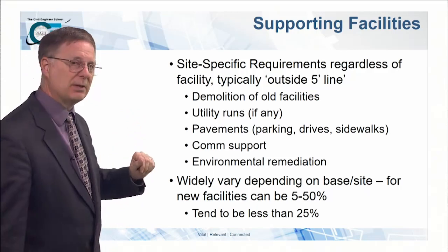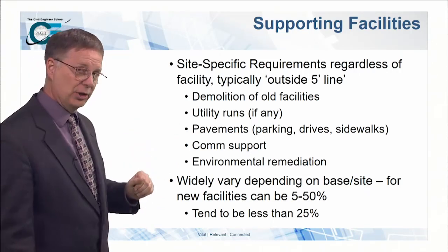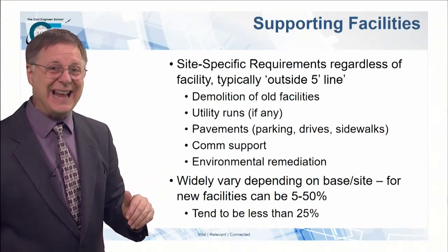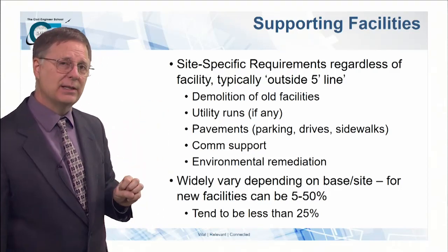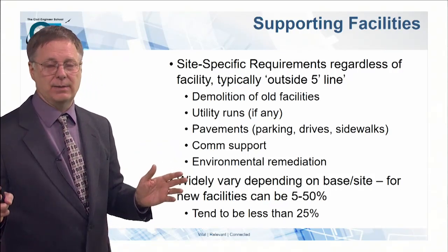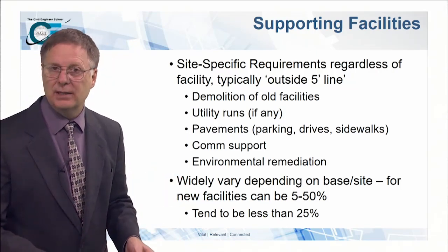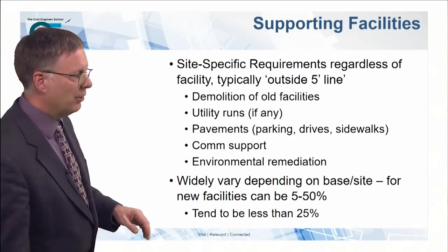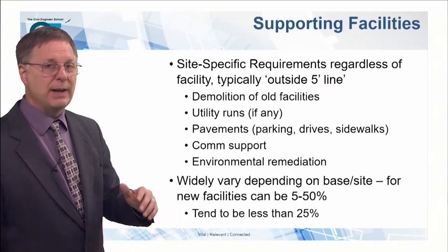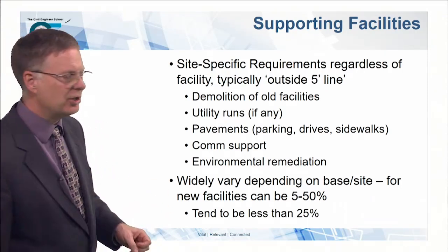Supporting facilities, again, are site-specific requirements. So they're typically outside the 5-foot line of the facility. They can include things like demolition of old facilities, utility runs, pavements, comm support, environmental remediation, a lot of different things. Again, I'm going to talk about this in a supporting facilities lesson. And it varies widely depending upon the site, depending upon the base. It can be as low as 5% or less, all the way up to 50%, although it tends to be less than 25%. So if you have more than 25% on a project, expect higher headquarters to ask you questions about it. But that doesn't mean it's wrong. It just means that they're going to ask questions. You need to justify that.